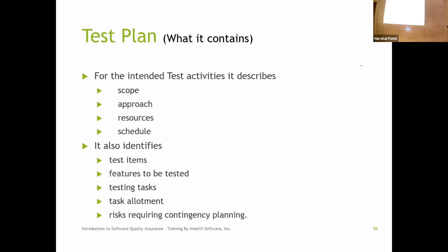Typically, let's say you ask for the last 2 weeks of the system development to make sure you have an opportunity to thoroughly test the entire system. It's a great thing. And they say, okay, based on this, here is the date that we will release this product to the customers. What happens if your development is not ready by the date you specified, and the business comes and says you cannot skip the date because we already committed and there's a lot of financial implication if you don't meet that date? Well, that's a risk now, right? You don't have a product that you can thoroughly test as you had planned. How are we going to deal with that risk?